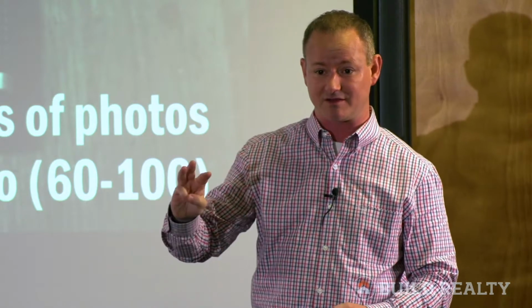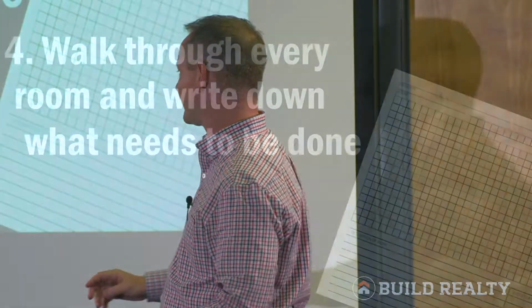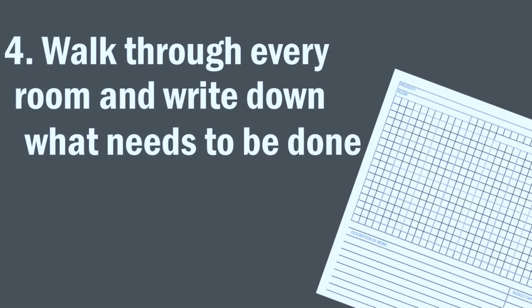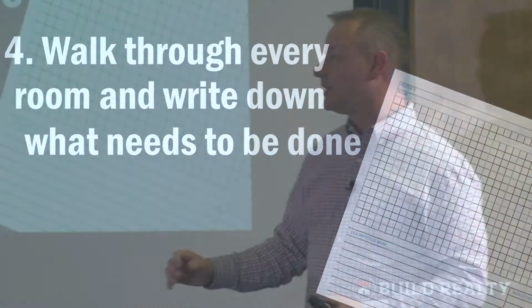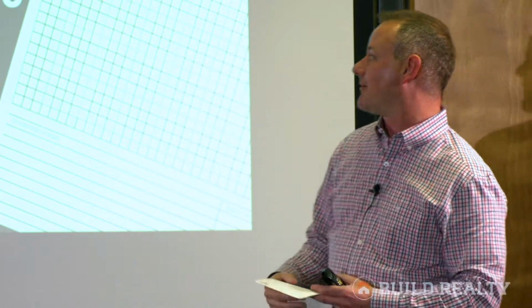So first thing, you're going to download the rehab worksheet. Then you're going to go to the house. Then you're going to go there and you're going to take a ton of pictures and videos. Now, this is where you make your money. You're going to walk through every single room and write down every single thing that needs to be done. So it's going to take you a while.